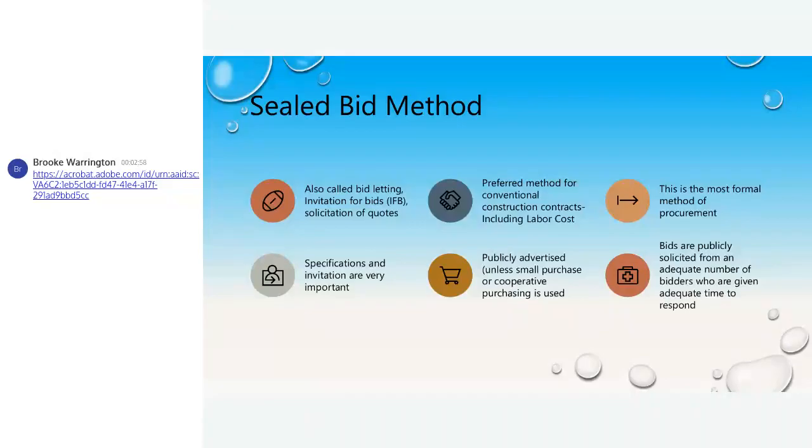He got caught behind a school bus, and the bid opening was at 3:30, and he came cracking through the door at like 3:34, 3:35. I was not allowed to open the bid to see even what it was. You're not even supposed to accept the bid. You can take them and keep them there unopened. You've got to be careful with that. So don't put your bid opening around whatever time your school buses are going to let out either. There are certain rules to doing this, okay?